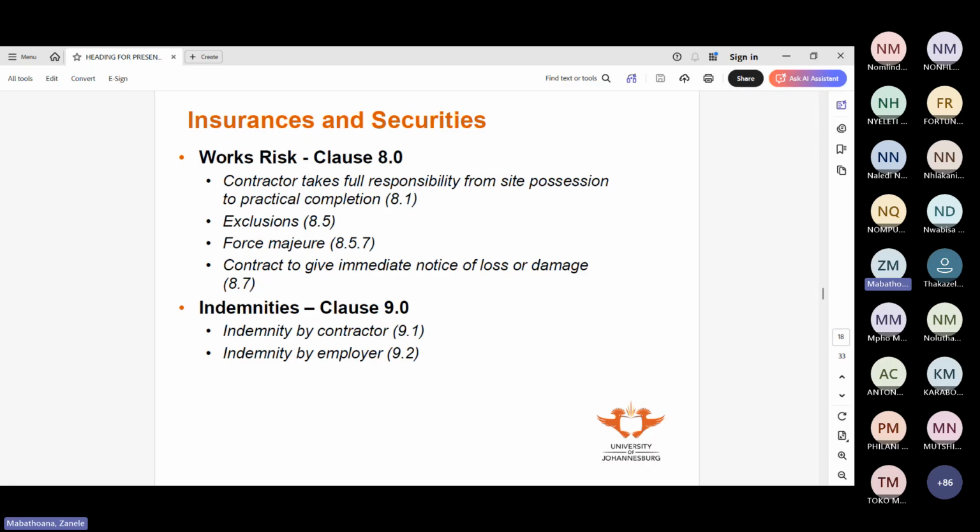And for some reason, the material, when you compact, may react, I don't know if react is the correct word, but you may find that it becomes even more compacted, and then you have to keep on putting more. So in that instance, when you're doing those engineering measurements, we know there's a fair amount of contingency that you build in because there's a high level of uncertainty.